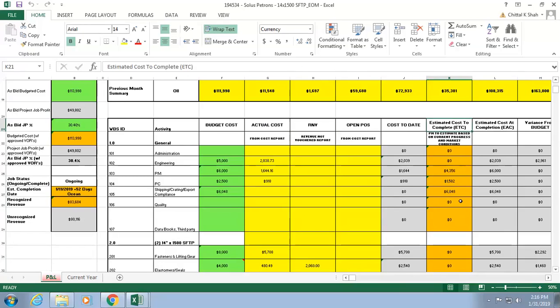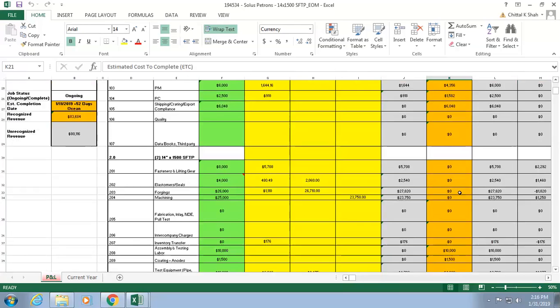Now, if you don't know too many details, you keep it as it is, where the budget is good enough, and I'm going to keep that as what I'm going to need to finish that. As and when the granularity starts in the project, you're going to start refining that value. I know that I've cut 3 POs, I'm going to need one more PO, which is going to be about $1,200. I'm going to put $1,200 in there, right?